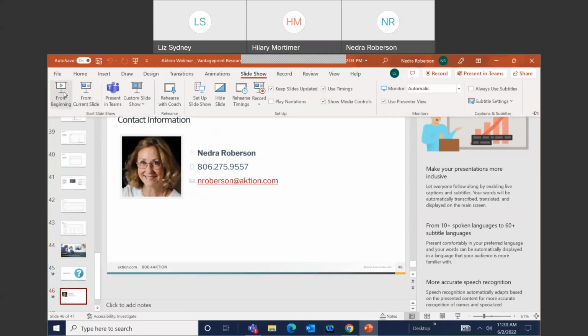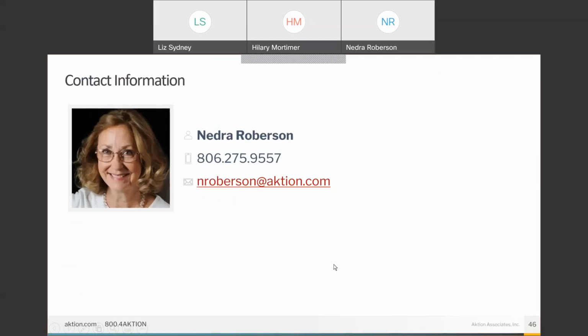Nidra, related to the filters, can you clear out dormant projects from your selection? Yes, you can. You can choose under status to have active, inactive, or dormant. So if you wanted to clear that out, you can remove the dormant, and sometimes it's important to leave the inactive in there because that person may have left your company and they have hours in plans that need to be reassigned. So that inactive can come into play very often in planning and resource management.